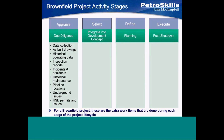The other thing I want to talk about before we get into due diligence is that most folks have some type of stage gate system to execute their capital projects. The stages are typically appraise, select, and define — and then after you get funding, you execute the project. The challenge with brownfield projects is that there's a whole series of things that need to be done on top of a typical stage gate process, because you have an existing situation and you're integrating new work with it.